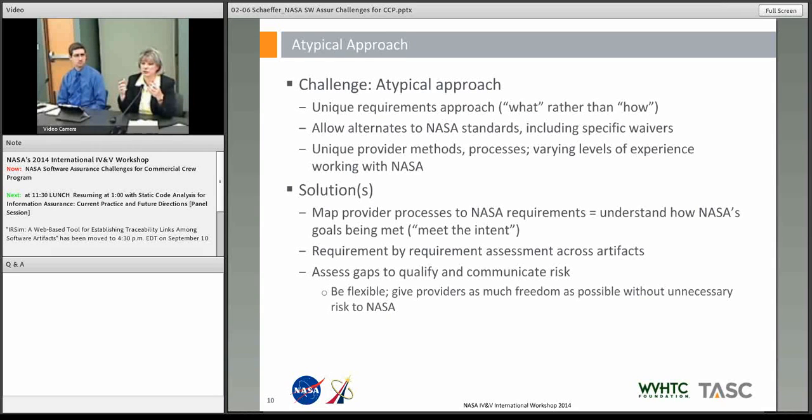Each cell captured where in the document, we tried to be as evidence-based as we could. We captured where in the document those questions were answered, and then we rolled the results up, identified the gaps, identified the associated risk, and that's what we communicated back to the program.